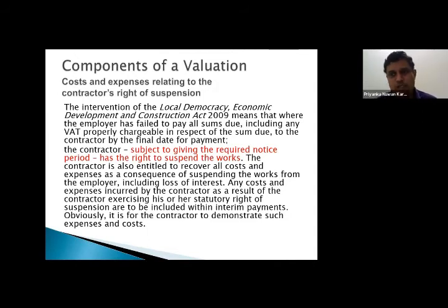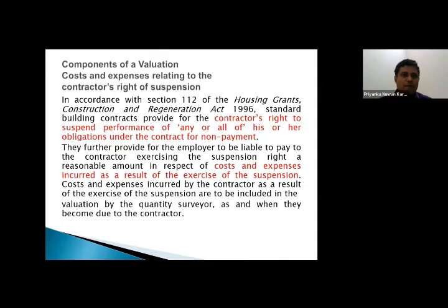It is stipulated in the law of UK that the contractor has a right to suspend the works irrespective of the type of conditions of contract or form of contract which is being used, right? The contractor is also entitled to recover all costs and expenses as a consequence. That is also there, right? And then the Housing Grants Regeneration Act 1996 also says about this contractor's right to suspension, cost and expenses.